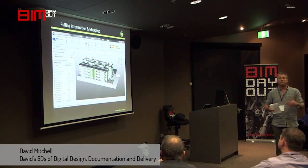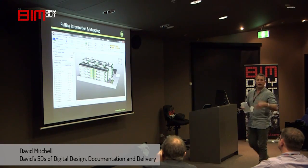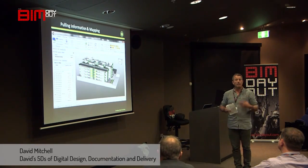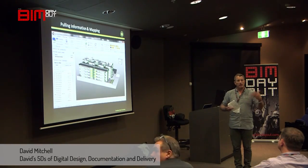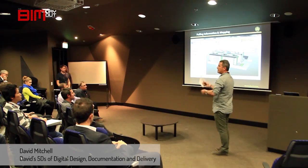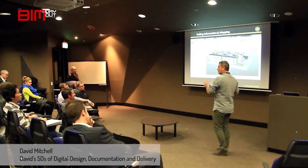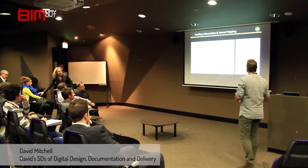So this is the shift — this ability to be able to recost something over and over and over. All we do is revision basically. We set up a map, bring in a model, and then make that map more detailed as the level of development of the model progresses. So that's one skill.